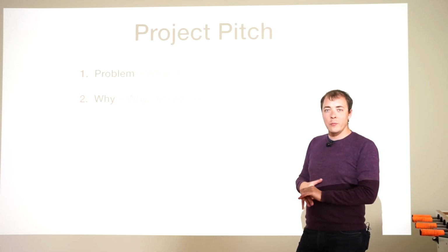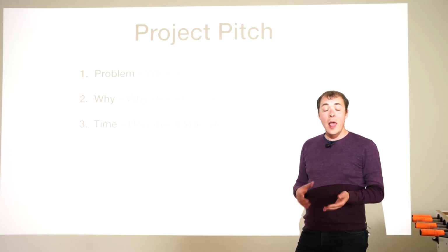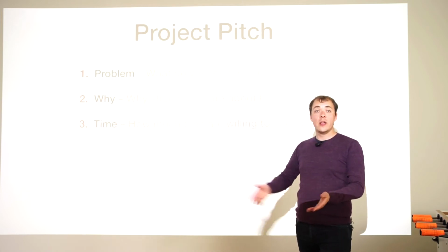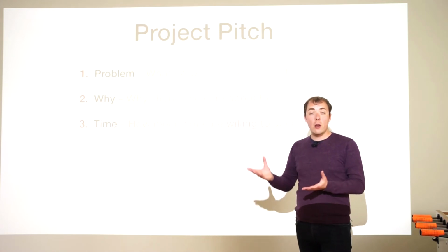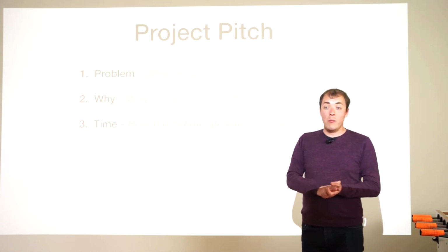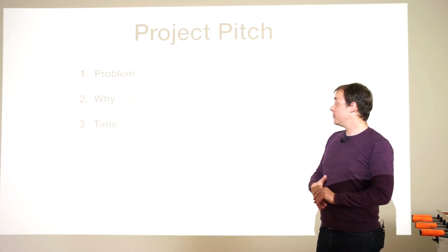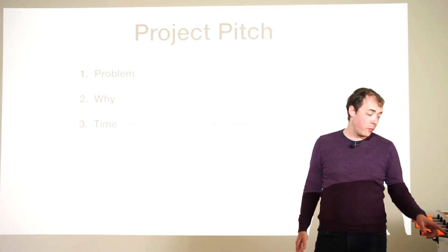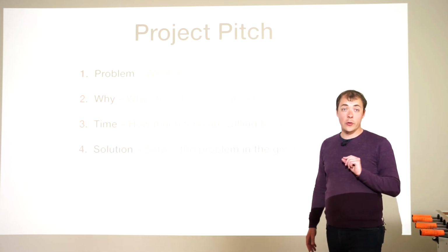Give me the reason. And then once you have given me the reason, give me the time. How much is this solution worth to you? I mean, we don't have a solution yet, but given just the problem and just why you want to do it, how much time should we allocate for it? Is it something that we should spend a year on? Is it something that, if it's quickly solved, we can solve it, of course, but never more than a month? Is it something that should just take a week? How much time are you willing to spend on that project? And only then are you allowed to talk about a solution.